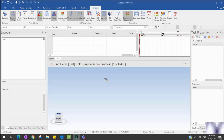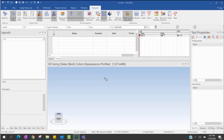Besides, when we do the optimization, because Synchro can consume data from other software like P6, Microsoft Project, or ASTAR Project, when you want to update your new schedule with the new data, you may need to make a backup — a snapshot from your current schedule. At that time we will make a baseline. I will show you the case.